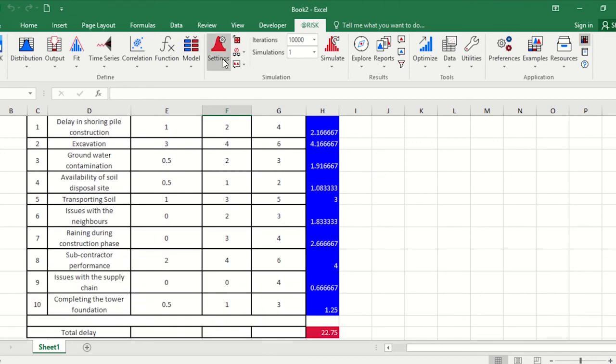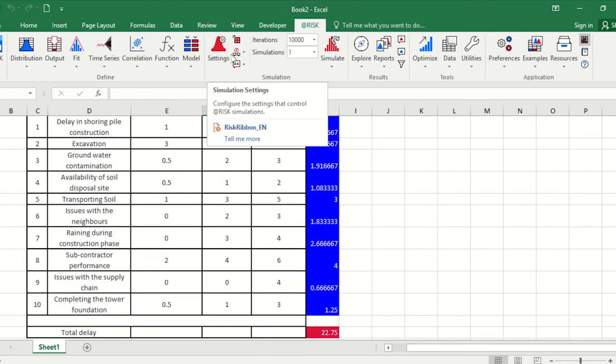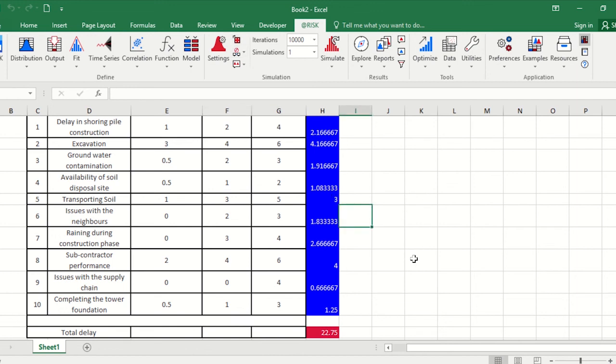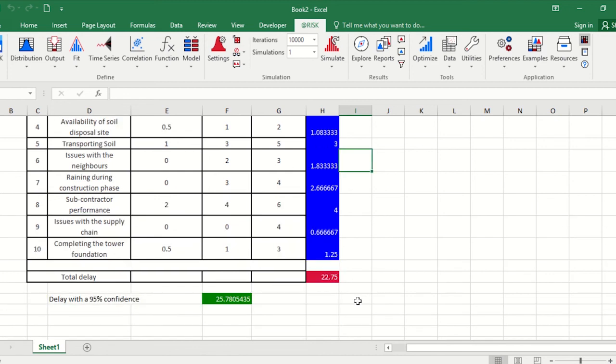There are different settings, and when running Monte Carlo simulations, there is a setting we call the random seed or a static seed. That represents repeatability. If we don't randomize all the values and we define a seed, then we would be getting the same set of results over and over again.